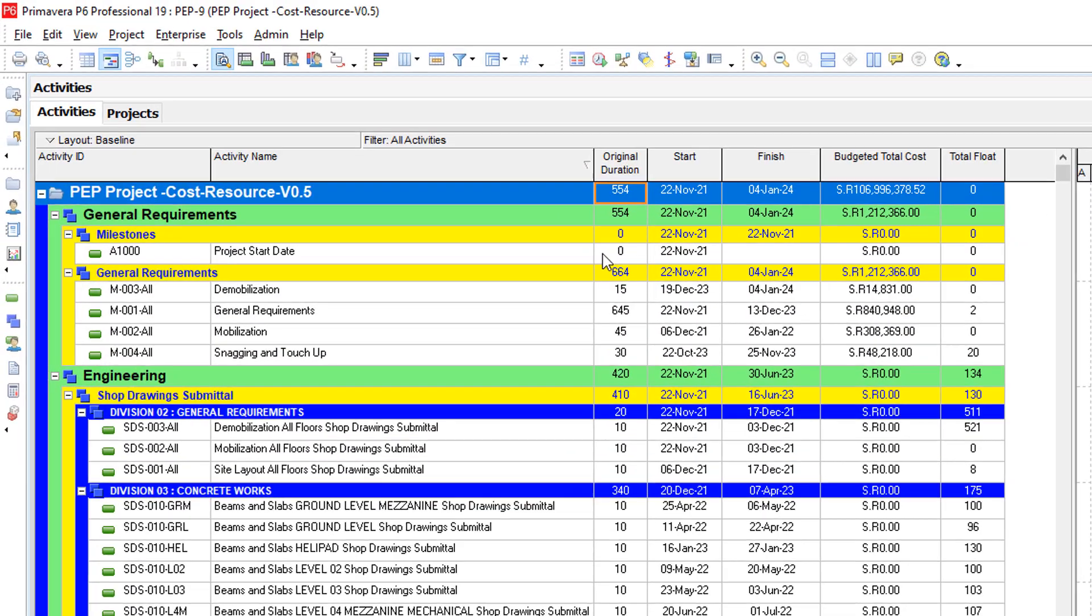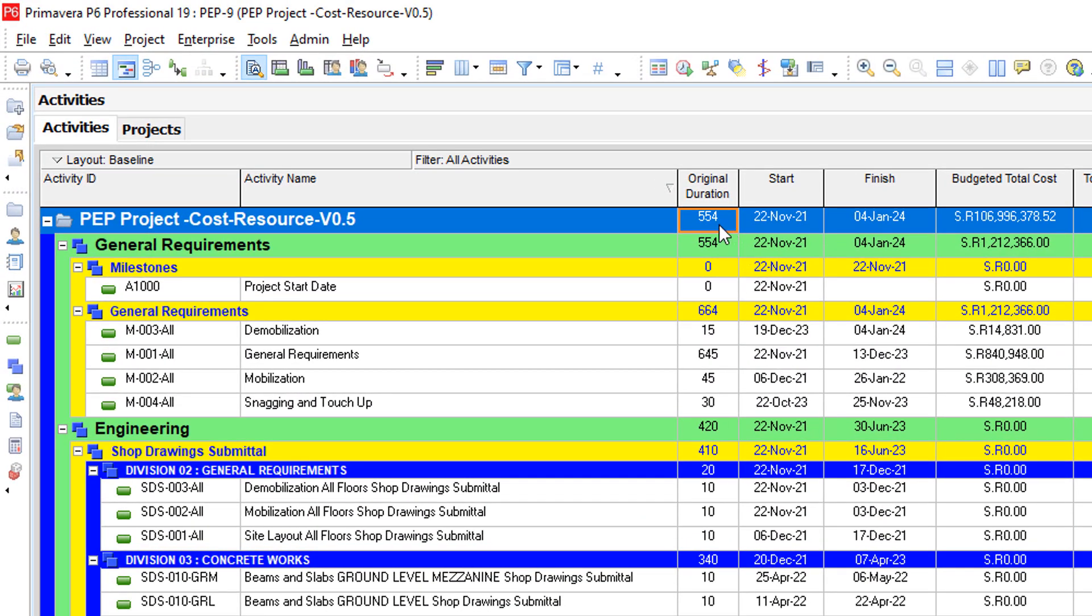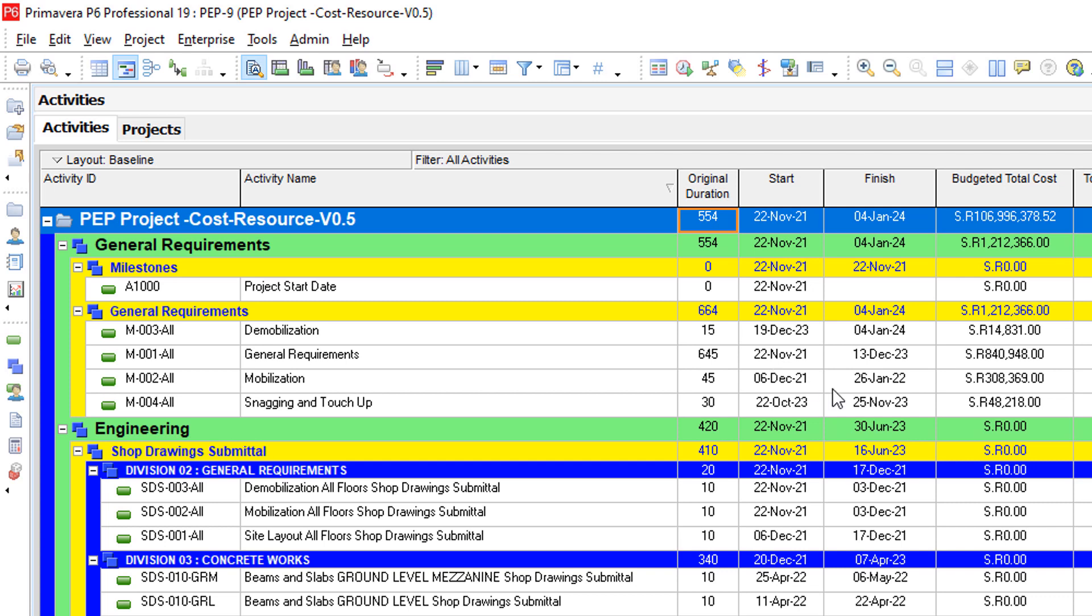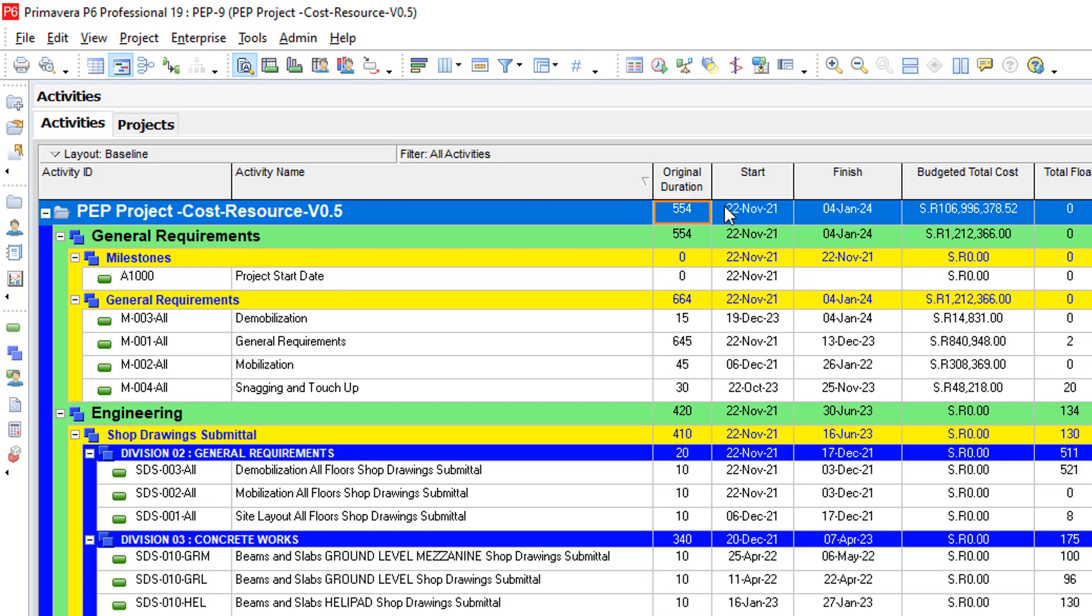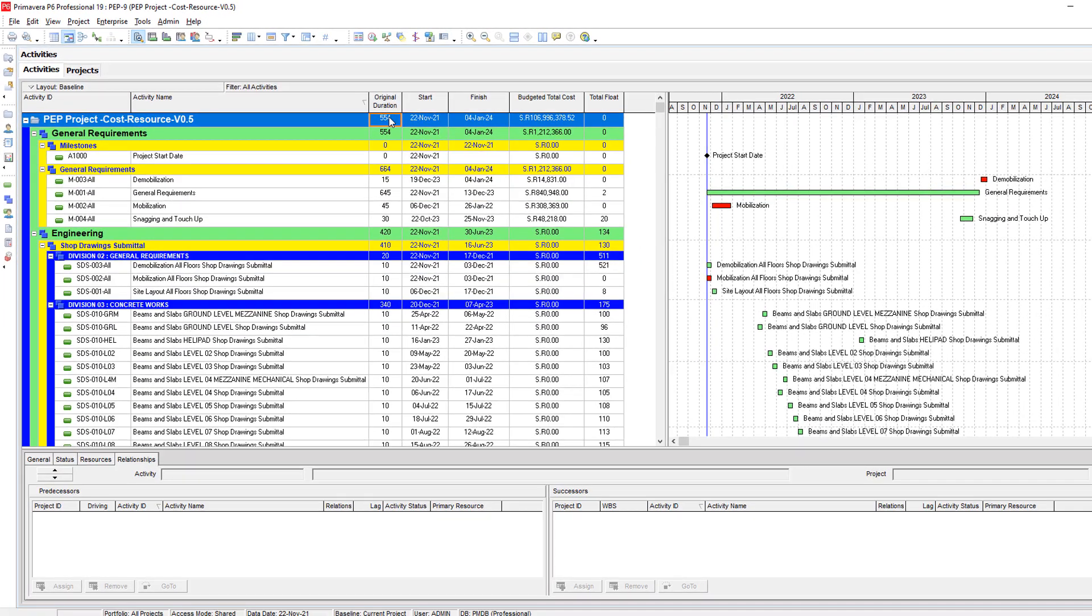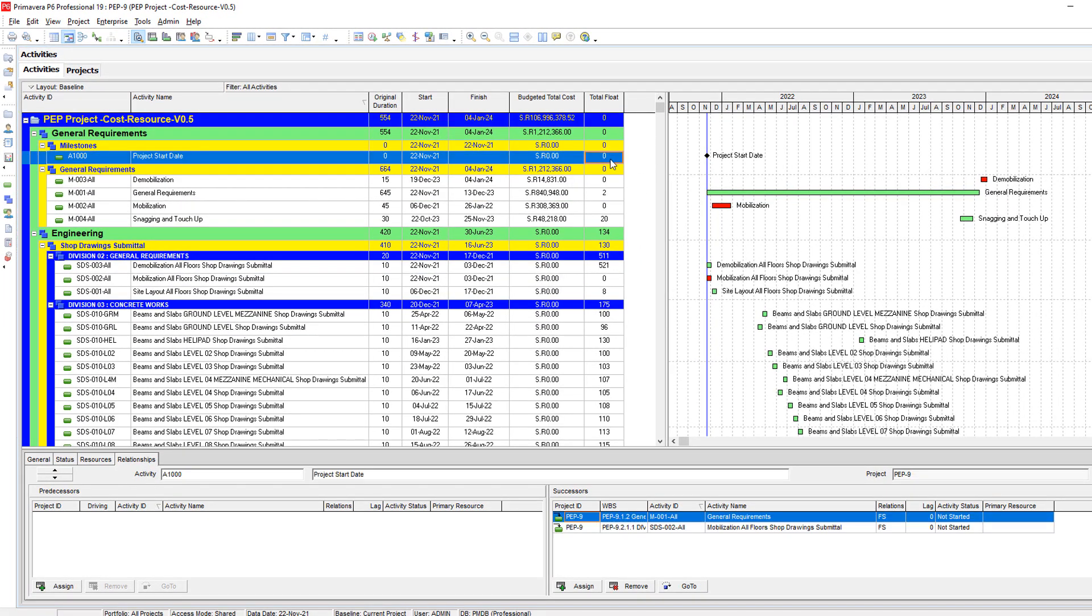This is actually very important because sometimes when you send or submit your schedule to the consultant or the client, they need to match the original duration, the total project duration with the duration written in the contract. And usually what is written in the contract is the calendar days. So how to show the calendar days regardless of your calendar used here?